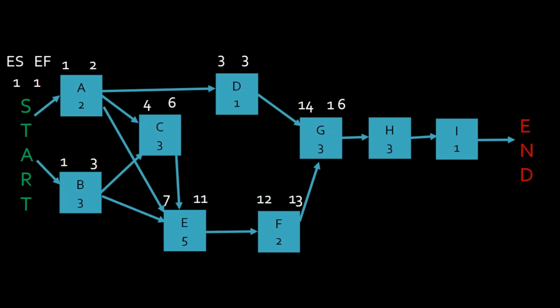So now, because it's a null 3-3 on D, D's done. They can sit there on the shelf. I did D and I'm done. Still can't start G though. G needs a component. Let's say D and F are 2 things that slide together, and I need them both to do G. D can be done, it can be done for 10 days already. I still can't do G until F is done because the dependencies tell me so. Okay? This is really the key, the dependencies. Do not violate a dependency and you will not get your calculation wrong.